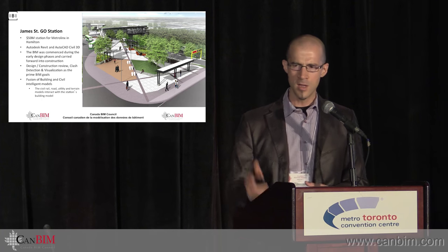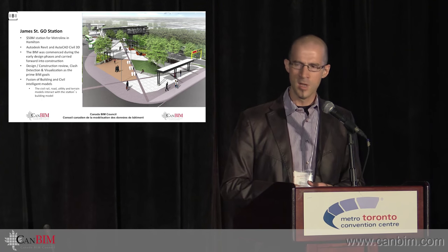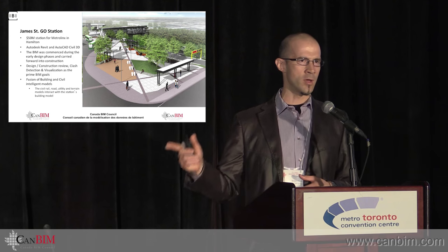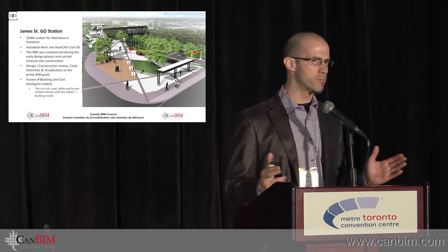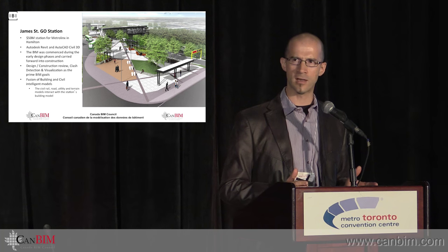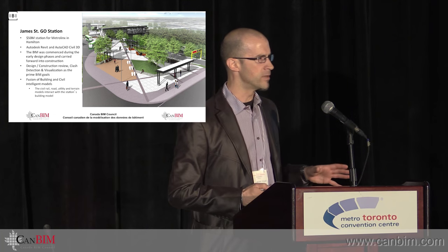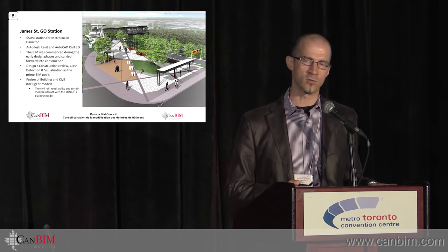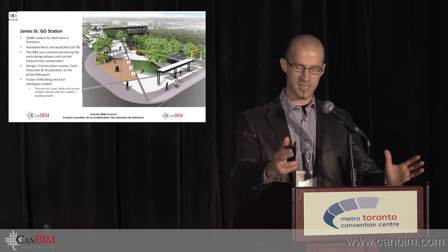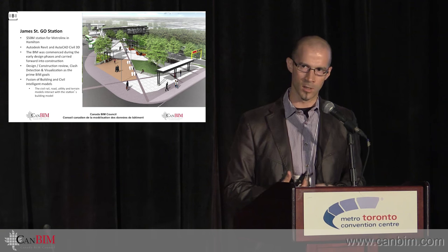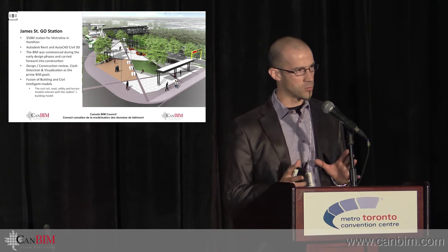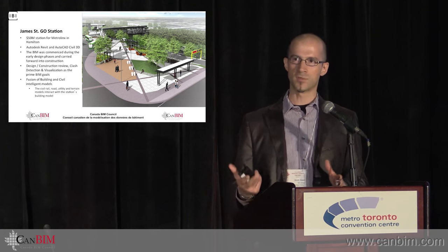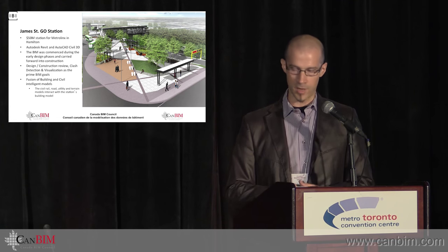It's pretty awesome. The soft clashes are the most critical. So where are my clashes where maybe a pier is clashing with the right-of-way of the train? So maybe the pier is a little too close to the tracks. Maybe there is a column in the vicinity of a handicap entrance or barrier-free access to a doorway or a stairwell or an elevator. Those clashes are probably even more critical, and addressing those are often done either through reserved spaces or through visual walkthroughs.